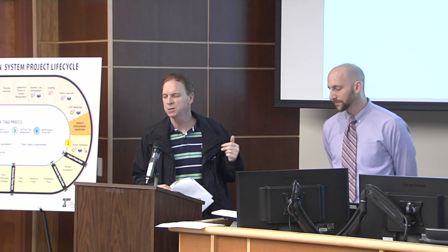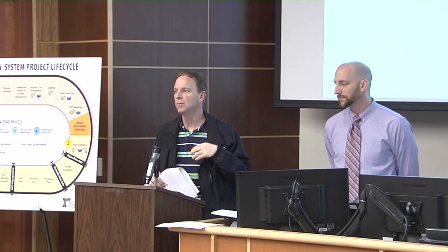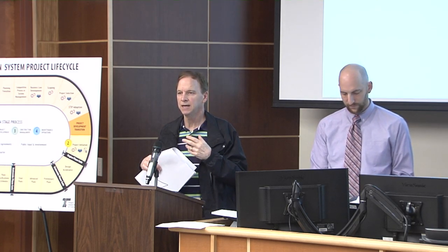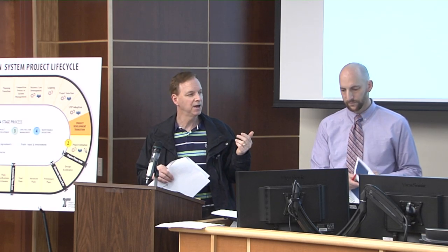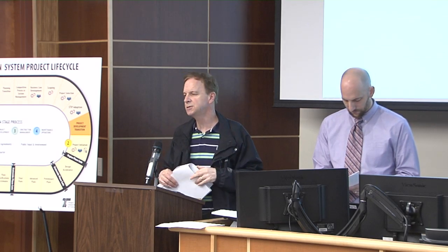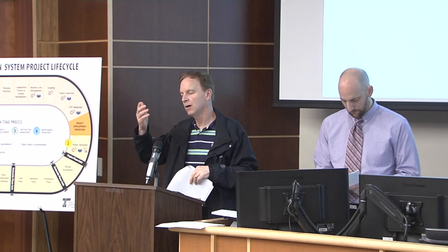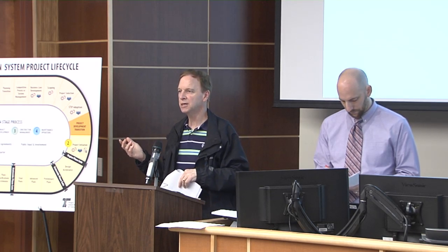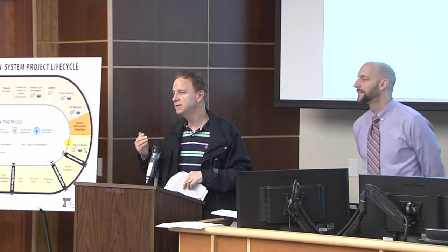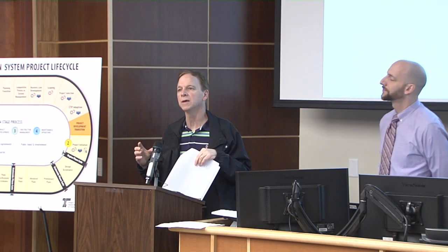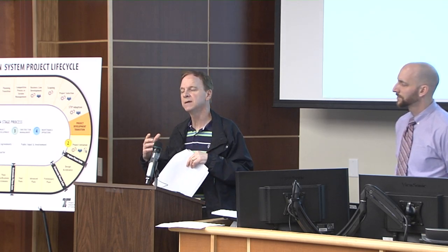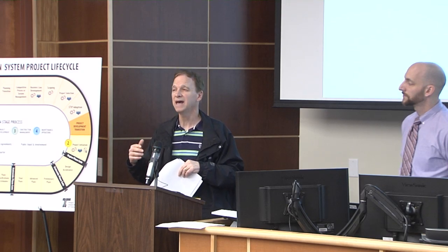In each region, I think in Region 1, they took the approach that once the scoping has been done, an estimate is developed to say here's how much a project costs. I think in Region 1, they hired a consultant to generate all those. In Region 2, we talked about how everyone assigned to scoping has a day job, and it's like, where do I fit scoping in? Whenever, I'll do it. So we put together a scoping committee in Region 2, and we asked, would it work for us to offload some of this scoping effort, hire a consultant, and have them do this?